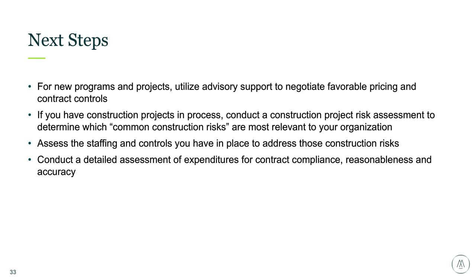And I also think a risk assessment is good at the beginning of a program startup, or wherever you are within the program, to figure out where your program is or what it's going to be, and then comparing that against best practices and getting those preliminary improvement areas to focus on can prevent a lot of excessive charges. If you have a capital program and you're into the pre-construction phase and you haven't finalized the design documents, that can result in a lot of overcharges. So having an outside party or a very qualified person to evaluate the program as a whole and assessing against best practices can save you guys a lot of money.